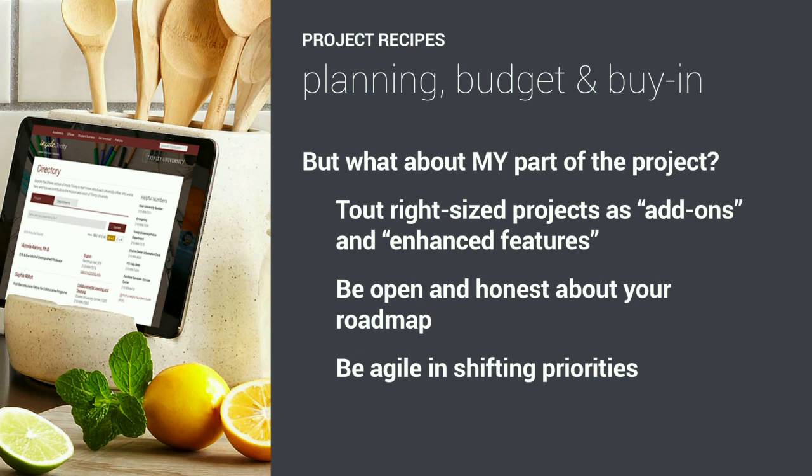It often helps for people to hear that you'll be able to spend more money on them if they wait 6 months. So we were open and honest about our roadmap. We showed people where they were on the roadmap in terms of timeline, and where they were in terms of resources and budget. This often helped us say, you know what, you have a really good chunk of time between September and December where your office can dedicate a lot of energy and effort to this project, so we want to help you be there right along the way. This will give us the most successful project. Again, we were able to be agile in shifting our priorities and move those chunks of projects around as we saw best fit other people's schedules, timelines, and energy levels.